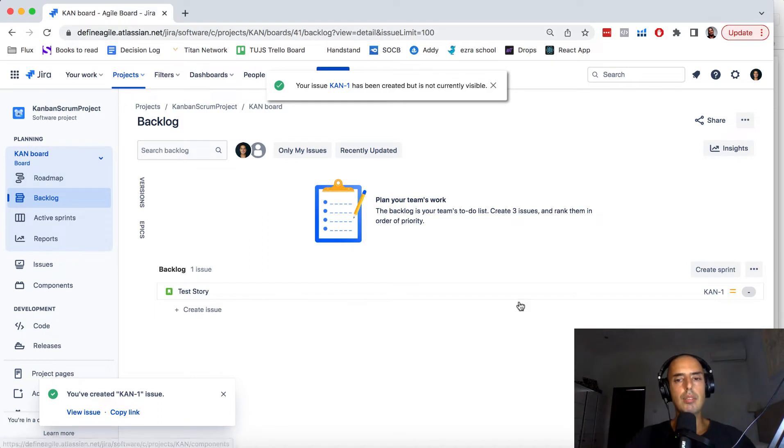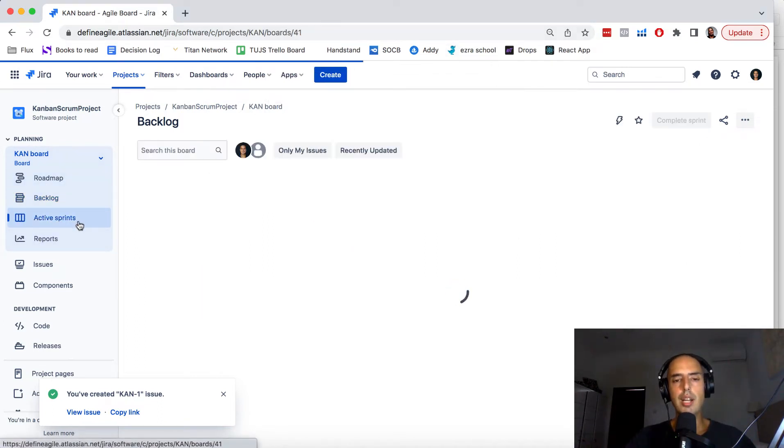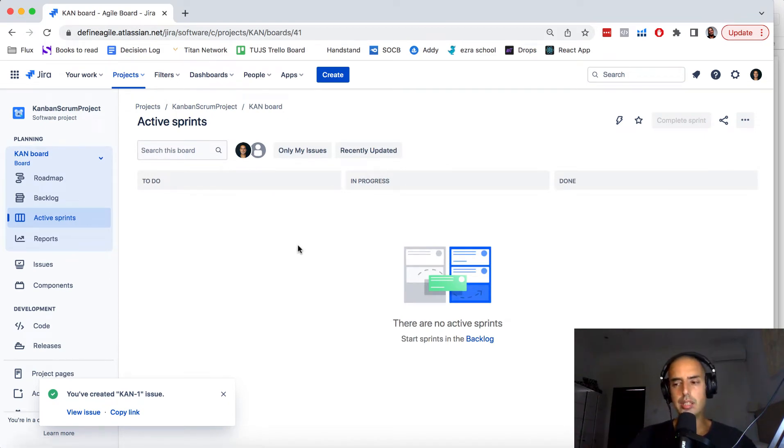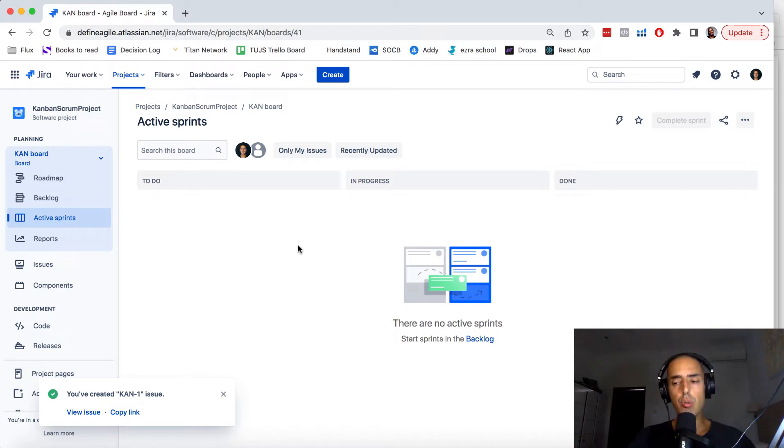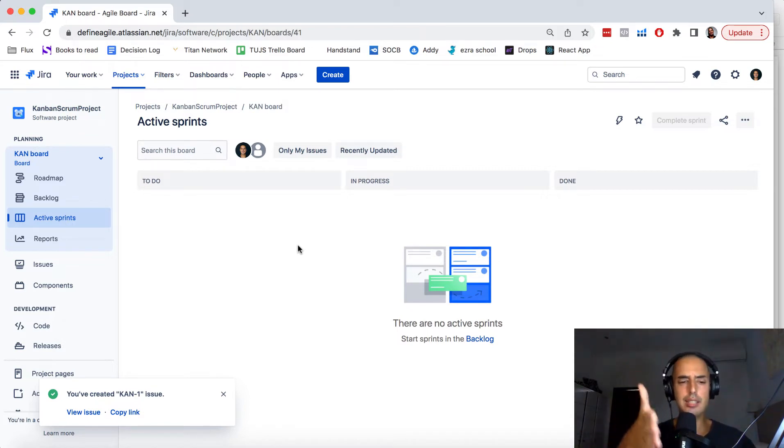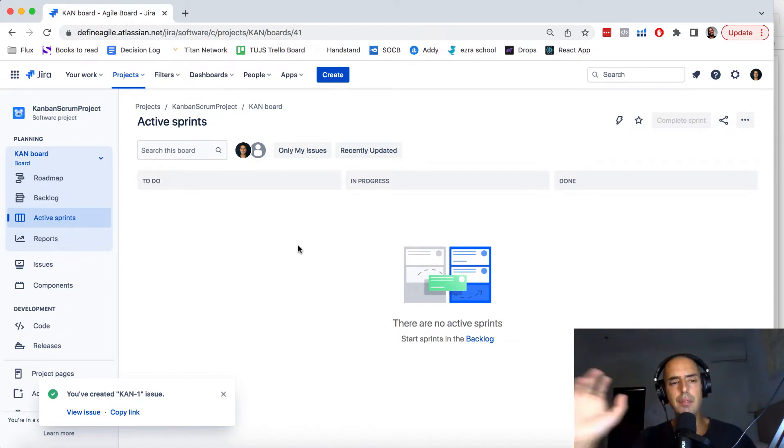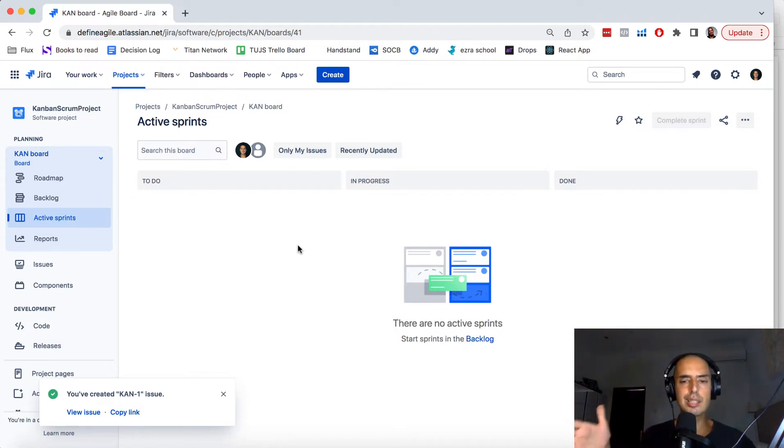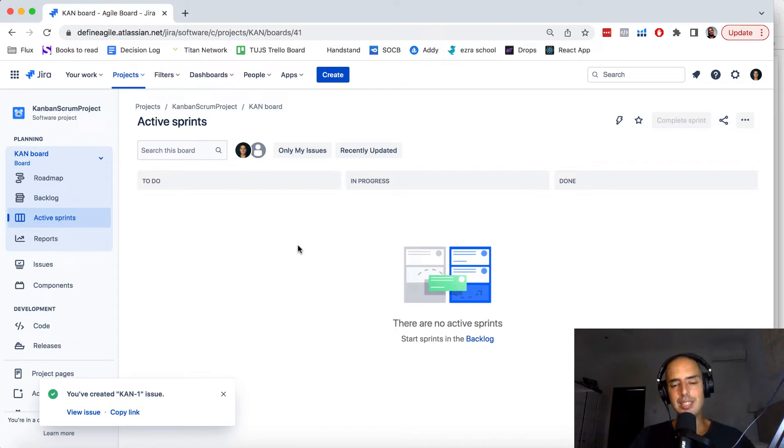So this can be your development team Scrum board. What if you want to have a Kanban? Like what's the use case for having a Kanban in Scrum? Well let's say you are a project manager and you want to have your own product owner in Scrum and you want to have your own board where you go for certain iterations. You go through analyzing the stakeholder requests to get requirements. You want to have your own board. And then when you are done it can go to development board or you're a designer and you're not working in sprints. You're working in other cadence. Whatever you can think of. So actually Jira allows you to do that.